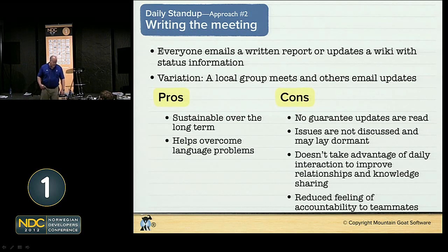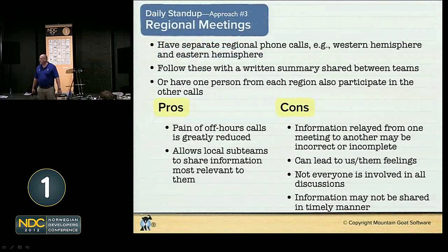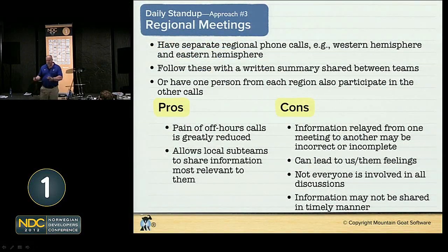Another approach is to do regional meetings. For the daily stand-up, do regional meetings, right? Have the California group do their meeting. They'll do it when they want. They'll do it at 10 o'clock. You guys do your meeting. Do it at 8:30 here, right? So you do your meeting, they do their meeting.